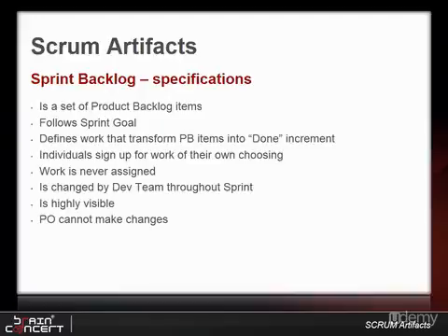The key here is that the product owner cannot make any changes to the amount of work that needs to be done until the end of the sprint. All the items will be marked as done or as an increment of done by using the following definitions. Increment equals the sum of product backlog items that are completed and usable. Definition of done: the sum of criteria that mark work completed.